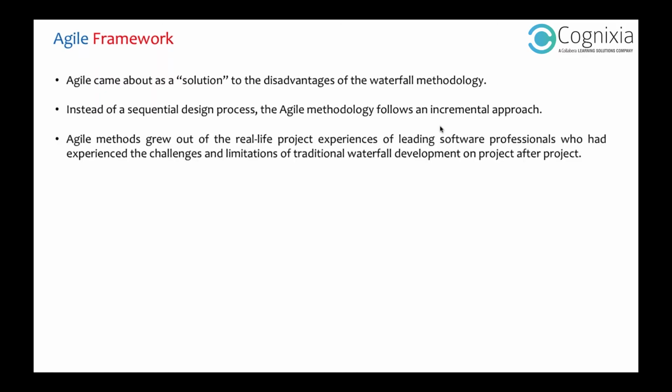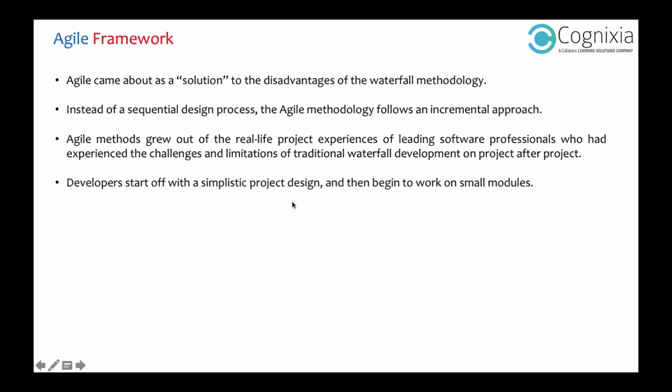This came out of real project experience, from people like you, project managers who develop a lot of software for clients and saw the problems they were facing. So you said, let's start with a simplistic design. For example, in month one you develop the entire UI UX, the whole fancy blue website. There's a tab for flight booking, a tab for multiple other services, and you present it to your client, saying, this is how it looks at the end of your product life cycle. Now, when he clicks on the flight booking tab, nothing works because no code is written. It's just the UI UX and the design of how the interfaces will look.